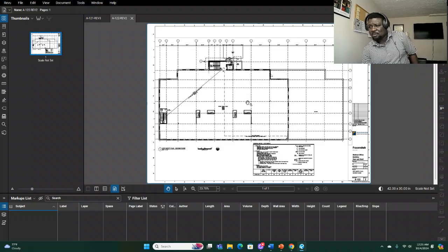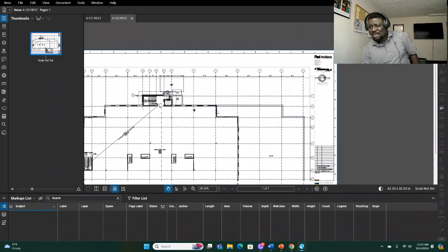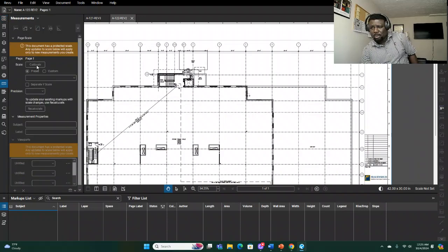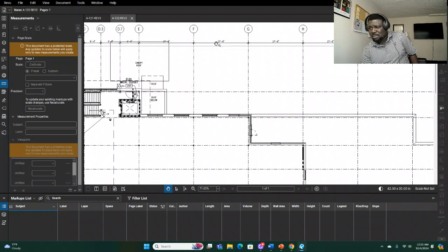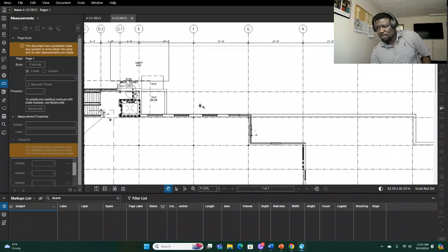So there are different types of drawings that you need, and then you can target around and do your estimate. So you look at that, you go to Measure. You can calibrate by measuring this dimension here. You see, I have a little update issue here, so I cannot pick the quantity takeoff tools here. This is your area tool here, and then we have the linear and then the count. These are all tools you can use to measure different aspects of your project.